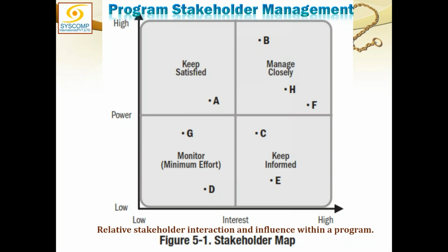I would rather divide that into a Likert scale from 0 to 10, both of them. Forget about the background quadrants. Just imagine that the total length of interest on the x-axis is from 0 to 10, and the total length of power is from low 0 to 10.